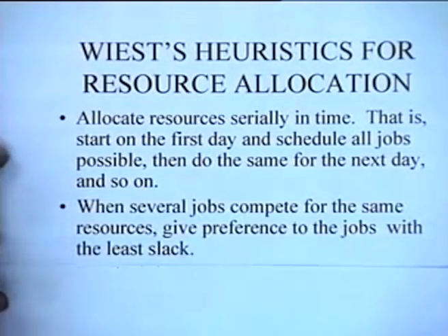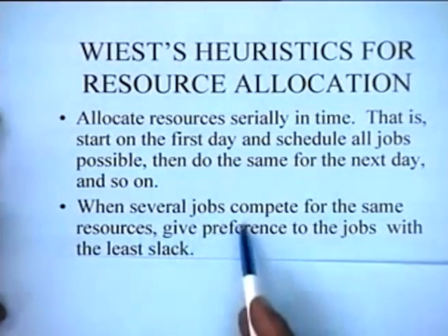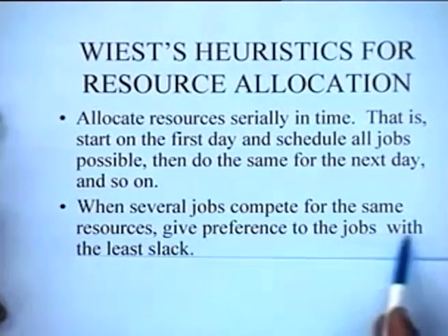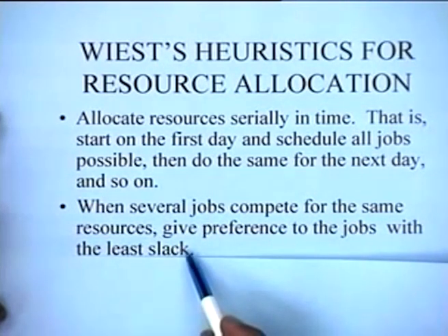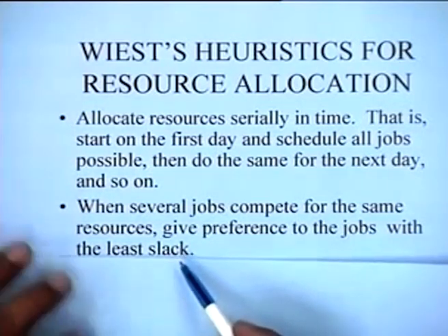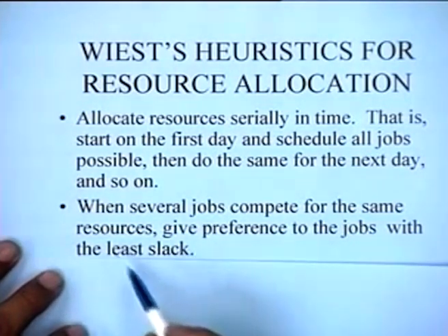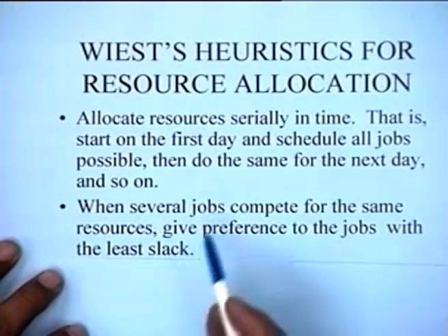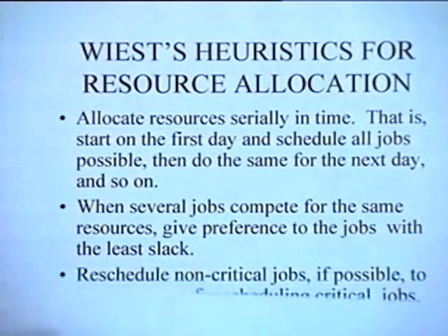The second heuristic says that when several jobs compete for the same resources, give preference to the jobs with the least slack or the least total float. So what we are trying to do here is use the heuristic of least slack to pick up the jobs.